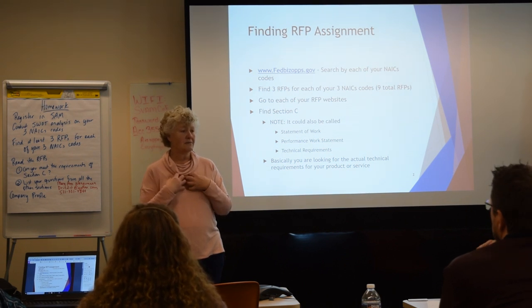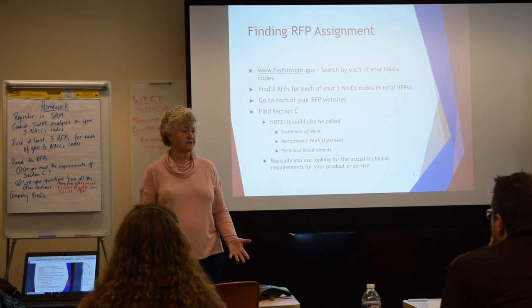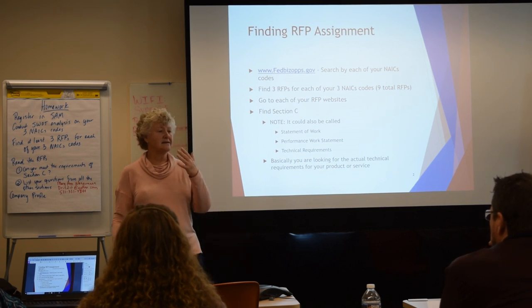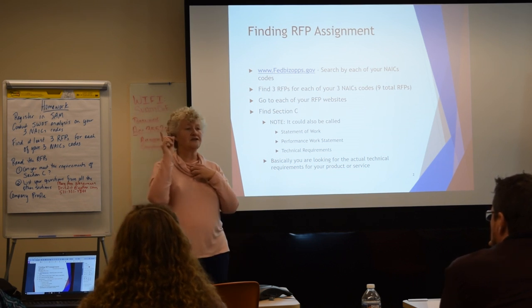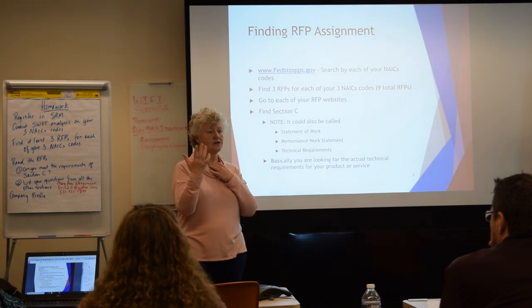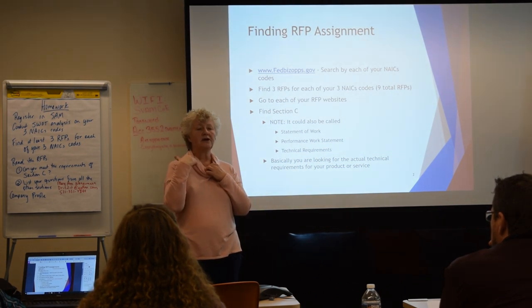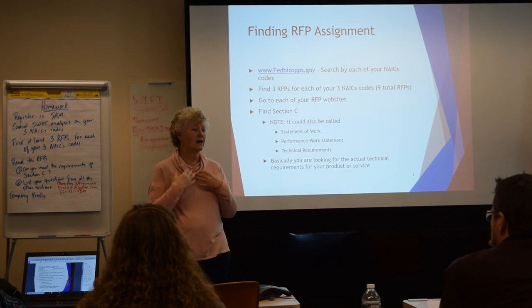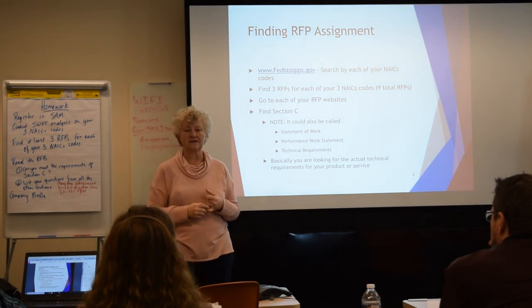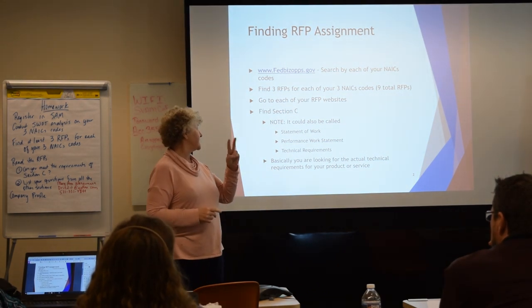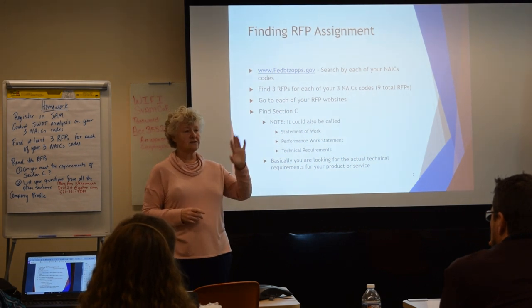We are, because we're telling them what our solution is. And therefore, if it only provides 50 lumens, we're not meeting the requirement, it's up to us to fix it at our own cost to get it up to 60. So when you see the difference between statement of work and performance work statement,